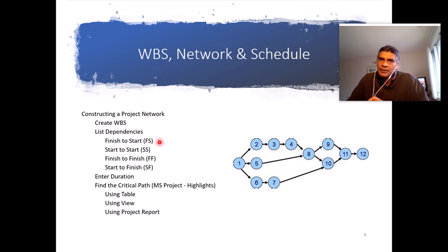90% of the task dependency in project management is a finish to start kind of relationship. Now, how exactly we can put all these things together in a tool, Microsoft Project, I will show in a second. But for your understanding from these key slides, there are three main concepts we went through. WBS, breaking down the task into smaller elements. We connect those tasks with the relationships, and based upon the estimation of duration, we say how long the project is going to take.